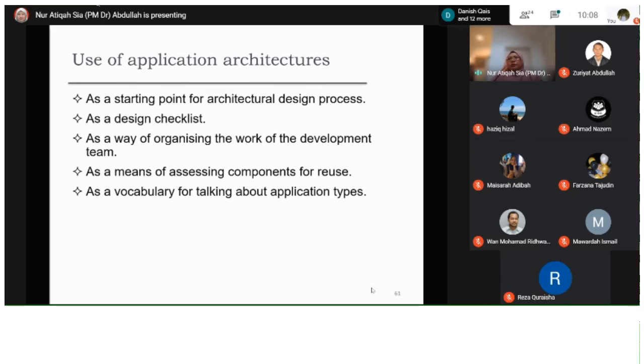Maka you kena ada cushion lah, kita namakan cushion. Cushion tu adalah add few days, sama ada cushion tu untuk setiap komponen ataupun cushion at the end. So it depends on the project manager nak buat lah. Contoh katakan komponen yang pertama dia kira estimate 3 hari, komponen yang kedua dia perlukan 4 hari, komponen yang ketiga dia perlukan 5 hari dan sebagainya. If you add cushion to every part, bermaksud yang proses pertama you tambahkan 2 hari, proses yang kedua you tambahkan sehari. Itu adalah add cushion to each part of it.